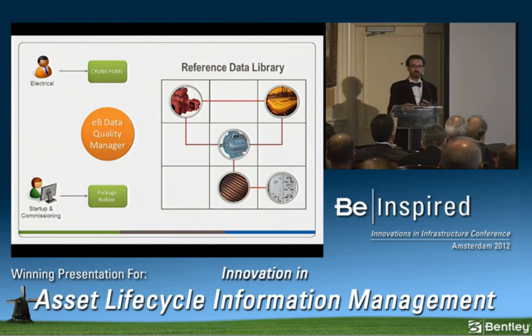This was a very manual process. It usually involved them reviewing oodles of P&ID documents, scraping asset information off the P&ID document. That's internal. External, they'd have to deal with those external partner P&IDs. And this was a cumbersome, a very labor-intensive process for the startup commissioning group.